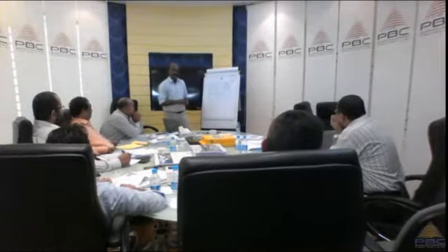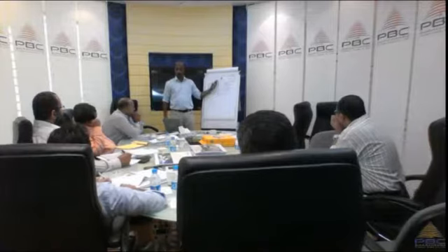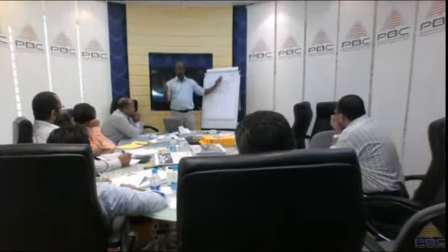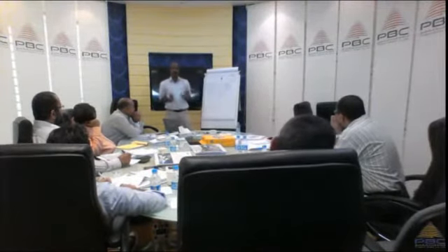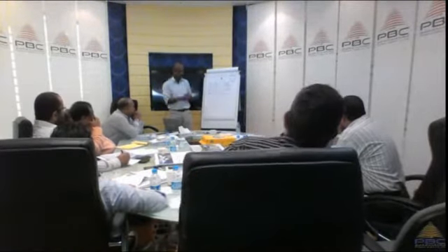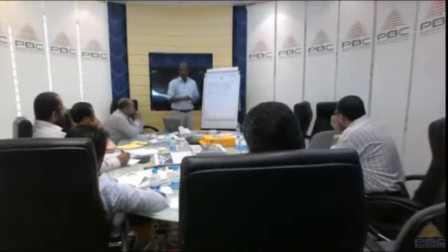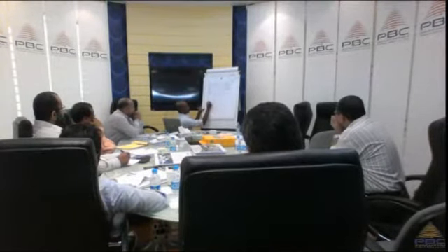So what's the PV by the end of day 1? Day 2, day 3, day 4. So these are planned values, i.e., the value of the work, and we're valuing things in terms of dollars. I'm even expressing days by dollar value. So by the end of day 3, our planned value was supposed to be 3.